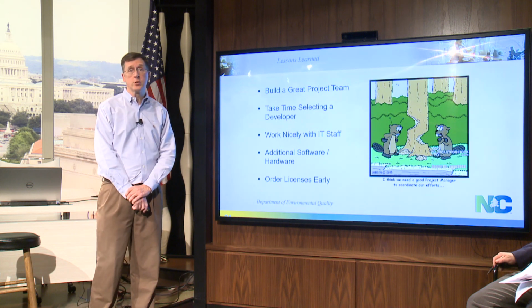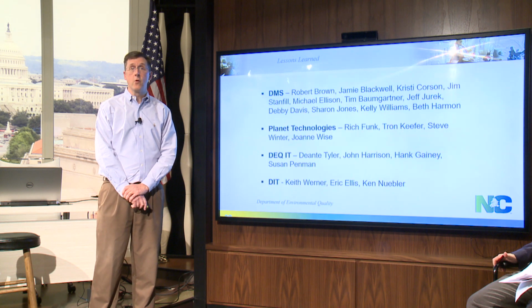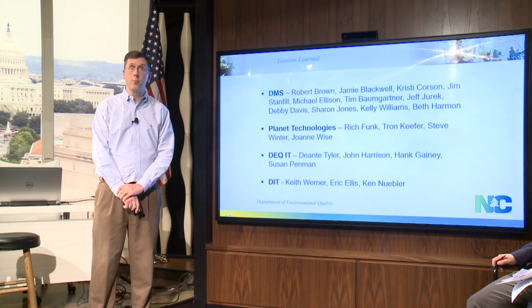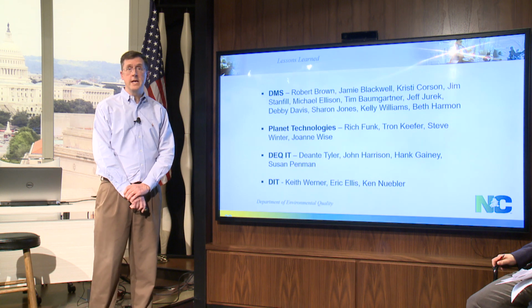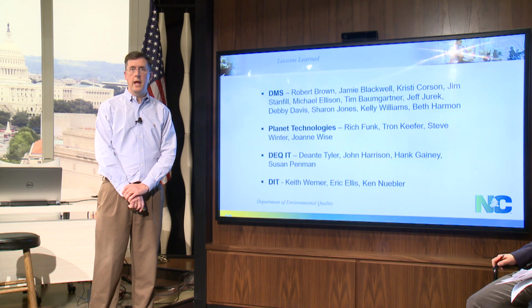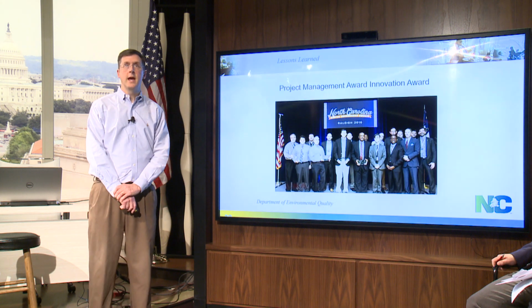You will have additional software and hardware purchases. Order your CRM licenses early. It takes a little while to get your CRM licenses. So all the people that went into phase 1, I just listed right there, from DMS, from Planet, from DEQ and DIT, they really helped us. This was a team effort, and it really went well, and we're really excited to be using CRM now.